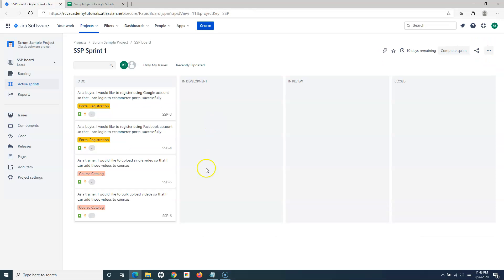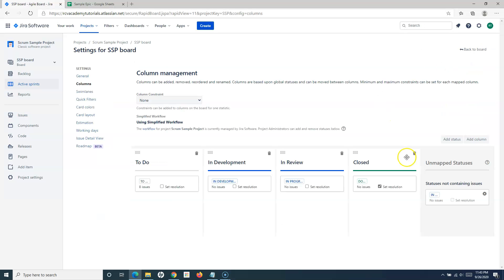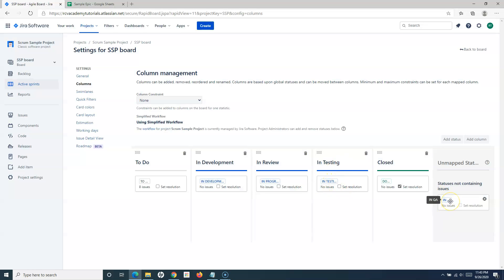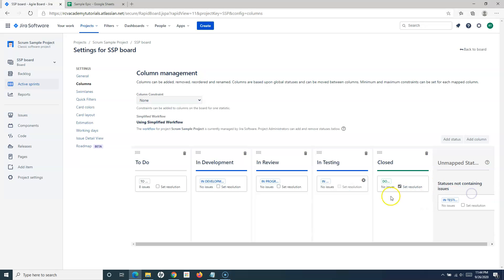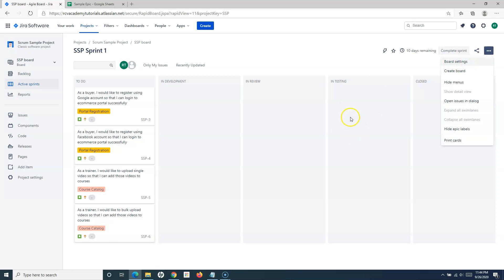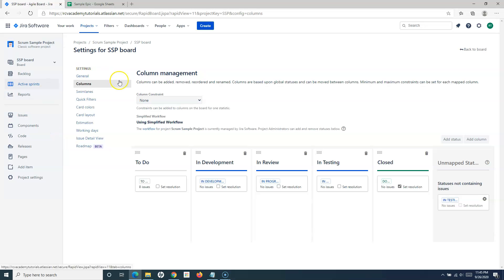Going back to the board, you can now see the columns: To Do, In Development, In Review, and Closed. To add an 'In Testing' column, go to board settings and add a column called 'In Testing'. You can then map the 'In QA' status to the 'In Testing' column and remove any auto-created status mapping. Now the board has an 'In Testing' column with 'In QA' mapped to it.